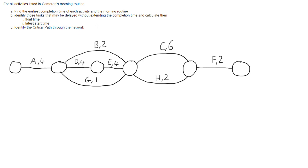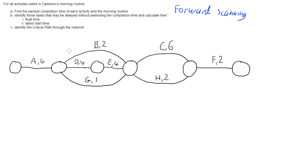For all the tasks which can be delayed, we want to work out their float time, the latest time at which we can start them without delaying the entire project, and the critical path through the network - the path of activities which cannot be delayed at all and must happen on time. To do this, we're going to use forward scanning, which is part one of critical path analysis. In the next video we'll look at backward scanning.